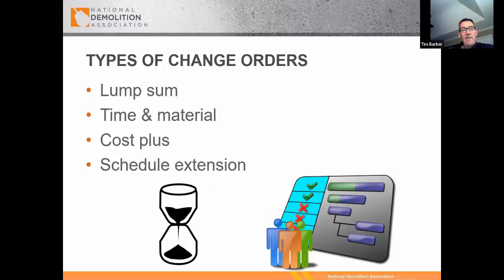Types of change orders. Some contractors like change orders, others don't. But if you're on a larger project, even a smaller project, more than likely something will come up where an owner will come to you and ask you to do some additional work, or they may ask you to do some work where they believed it was in the original contract, and you'll pull it out, you'll look at the contract, they'll look at the contract, they'll look at your proposal and realize that it wasn't. And at that time, you will perform the work as a change order, as an extra.